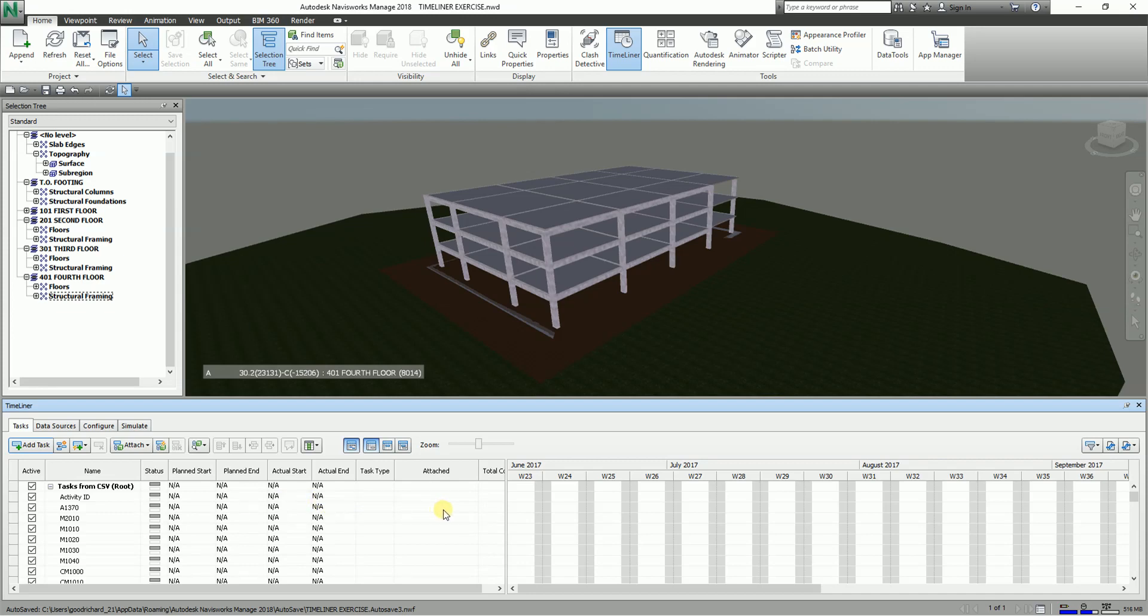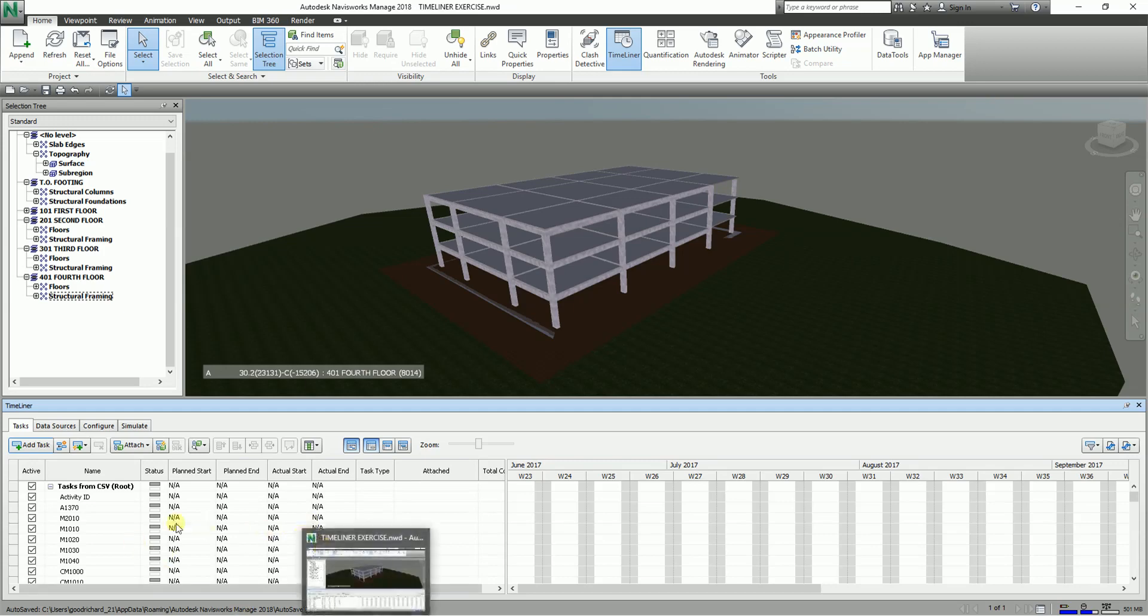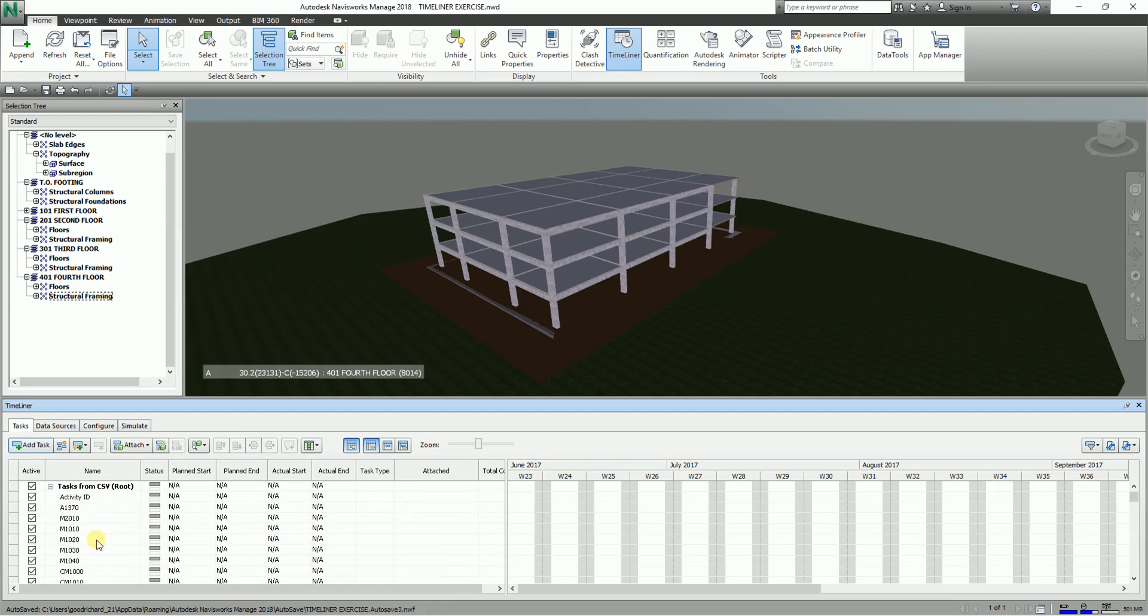These are the tasks. As you can see there are no planned start, planned end, actual or task type or any attached elements in these things because it has not something to do with this model here. Of course if you have the appropriate model you can attach this.